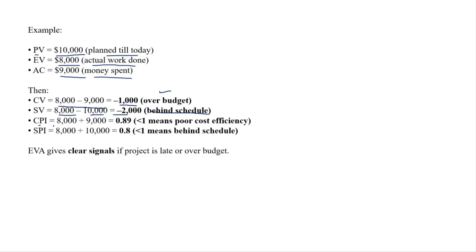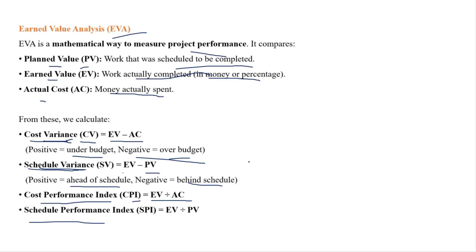Then CPI = EV divided by AC = 8000/9000 = 0.89. Less than 1 means poor cost efficiency. SPI = EV divided by PV = 0.8. Less than 1 means behind schedule. So EVA gives a clear signal if the project is late or over budget — it tells us whether the project is inside or outside schedule and budget.